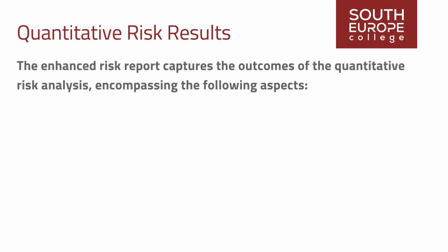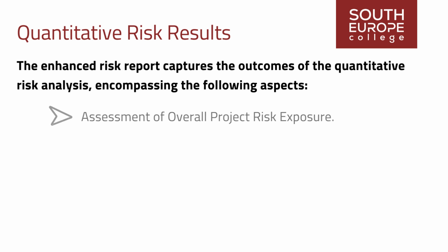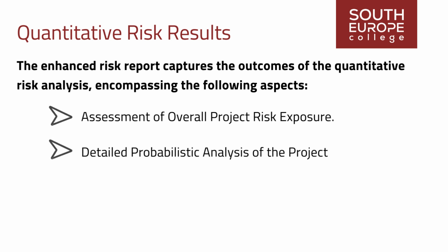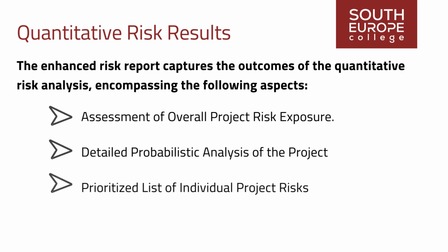The enhanced risk report captures the outcomes of the quantitative risk analysis, encompassing the following aspects: assessment of overall project risk exposure, detailed probabilistic analysis of the project, prioritized list of individual project risks, and recommended risk responses.